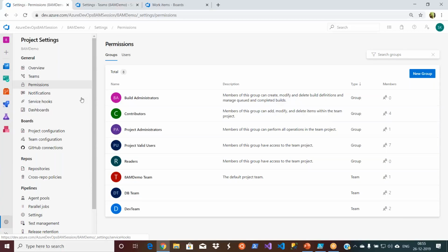The other task is still in the new state. After 3 days, my first task is finished. Now I will pick up the second task and change that task status to in progress. Basically, some statuses have to be changed by the product owner. Once a task is assigned to you, you can change your task status, not the other statuses.